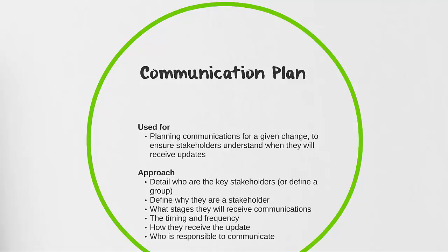Communication tools are almost the most vital in every change management situation. Very often, communication is referred to as almost 80% of what a change manager or a project manager's accountability is. Ensuring there's clear communication with your teams as well as your stakeholders is critical to success. A communication plan will outline who the key stakeholders are, either by a group or individuals, and define what their relationship is back to the project, and also at what stages and how often they'll receive communications on the status of a given change.